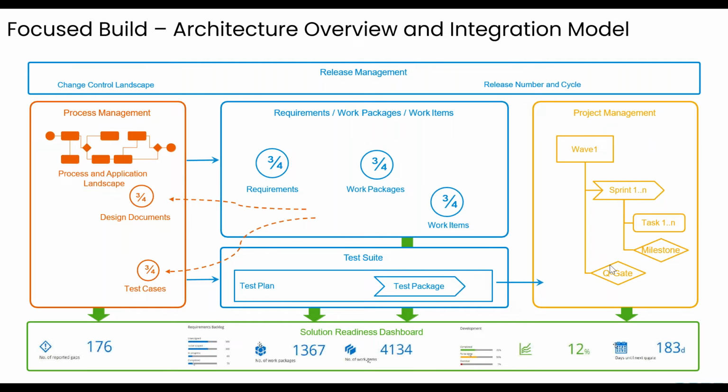Now, to discuss a bit about project management and sprint planning. In SAP Solution Manager with Focus Build, you'll have different waves and sprints that you could tie directly with all of these deliverables. So the goal will be to structure the project in such order where we'll have multiple waves for the project. Each wave will contain some type of deliverable, not necessarily an entire release, but some type of deliverable that we can call done. And then within that wave, we could have many sprints.